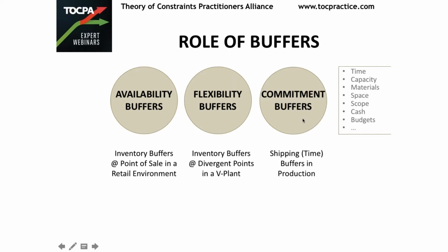Right? If you want your project to be able to recover when it is falling behind, the way to do it is to spend extra money, spend extra resources. The extra resources that you should have in the project is the real commitment buffer that allows you to meet your commitments. The time buffer in the projects, the project buffer and the feeding buffer, is not a commitment buffer. It doesn't protect your commitments as much as it gives you flexibility of schedules. So the time buffer in the projects is more like a flexibility buffer. The money, the resources are more like commitment buffers in projects.